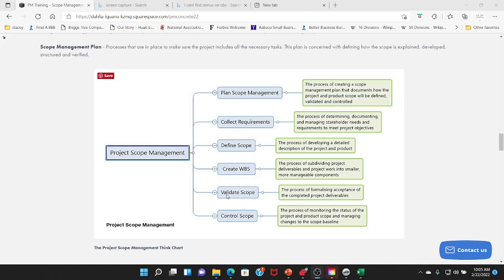So, right, basically your scopes of work create your WBS. Okay, and we create our scopes of work by breaking down our construction documents, right? Doing the takeoffs, the cost estimates, because once we do the cost estimates and we do all that, we know how long each individual process in our project will take.